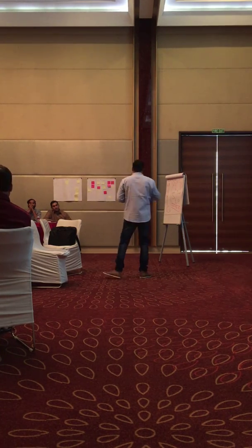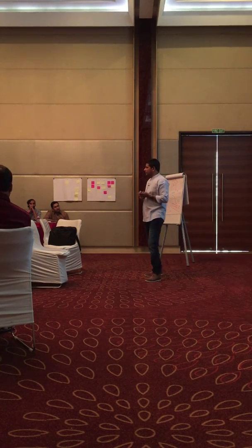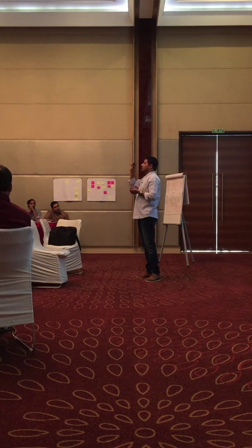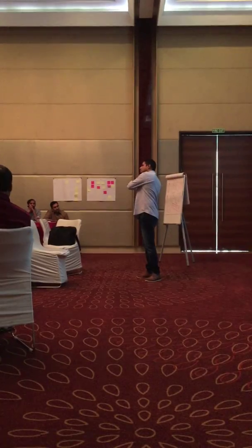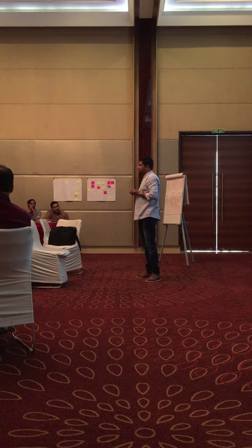See, you have a sprint backlog that might contain 5 stories or 6 stories or whatever it may be. Each story will have subsequent tasks associated with it. So when you pick up the story, the team will work on those tasks. When all the tasks are complete, the story is considered to be complete. And the definition of done.